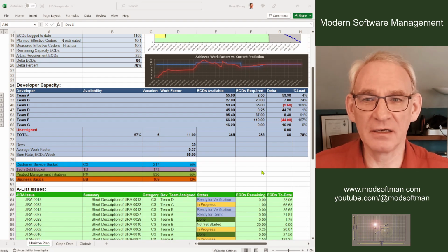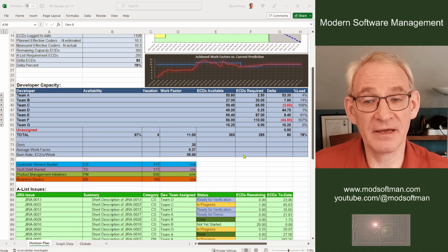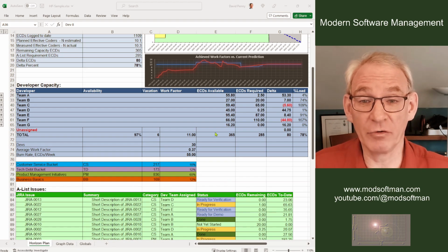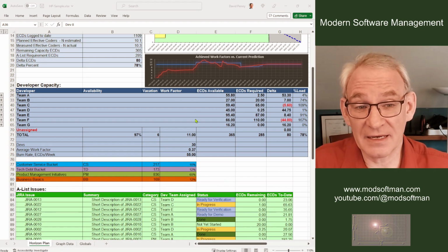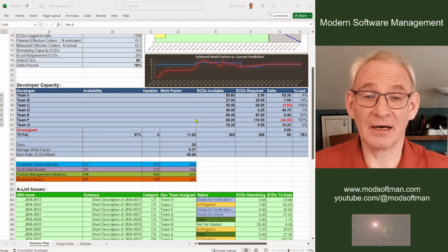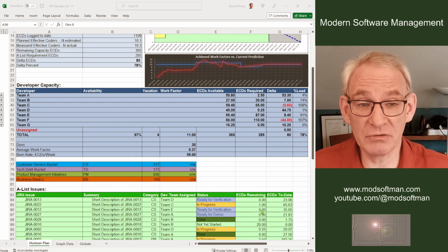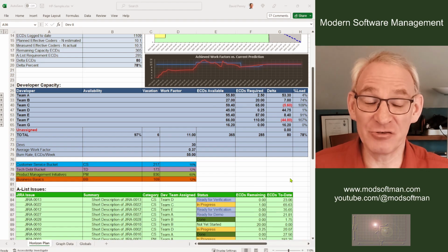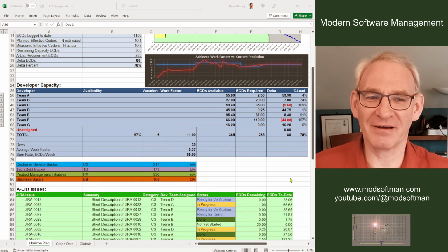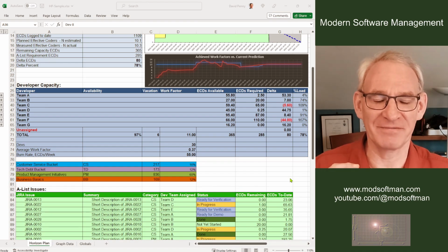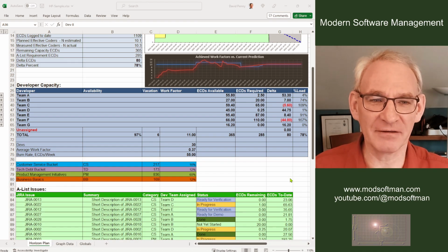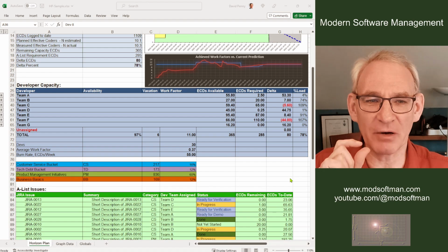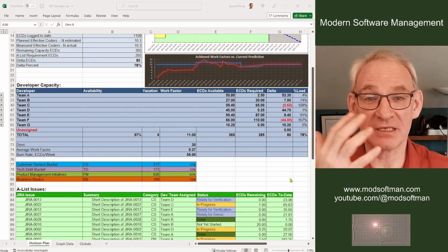So it's very empowering to the software developers as well that they have elbow room to do this tech debt reduction and the business basics type things. They have elbow room in the work factors to work on, say, the pipelines and improve those. They have elbow room to do the feature correctly. And I guess the price they pay for that is they do record their time, but not all their time. It's not, this is when I start work, this is when I stop work, I took a coffee break here. We don't ask for that level of detail. We only want dedicated individual contributor coding time on specific features. So that's obviously a fraction of their time.